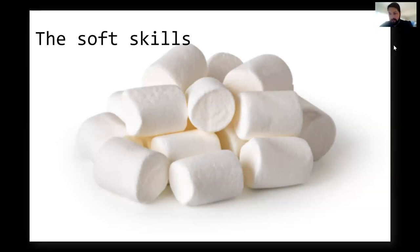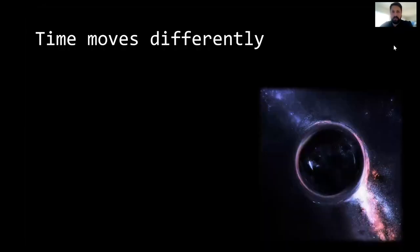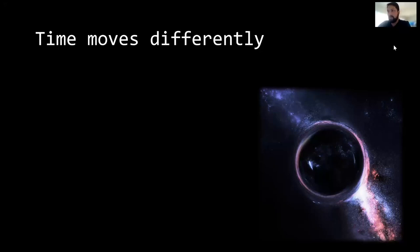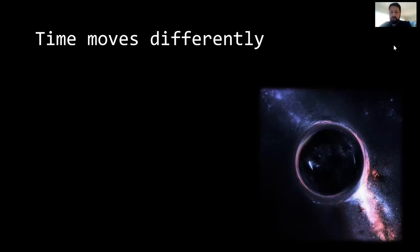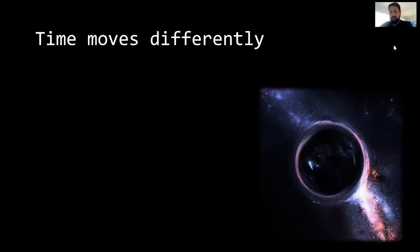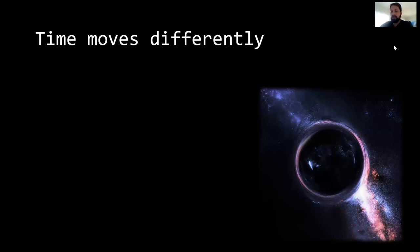Now on to some differences. That is the majority of this deck here. So time moves differently. What does that really mean? I found that in software and hardware, the rhythm and lead time of these products is very different. So with hardware projects, you may get 12 to 24 months even of lead time, meaning the time between you kick off the product that you're working on until the time that it is generally available or that it is launched. Also, those end dates or deadlines are usually pretty hard. There's a launch event coming up. That's probably not going to move by a whole lot. If it moves, then it's maybe going to move a full year or maybe your product is actually going to get canceled. So hardware has long lead time and they're pretty solid. The times are pretty solid.